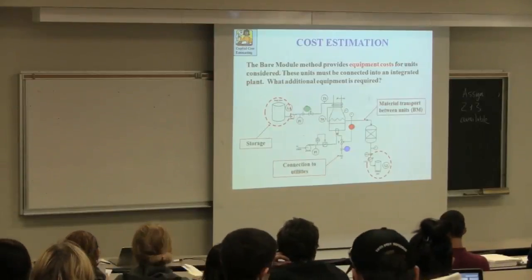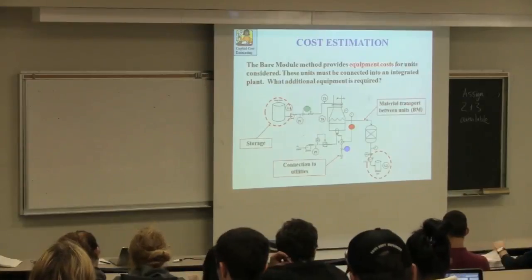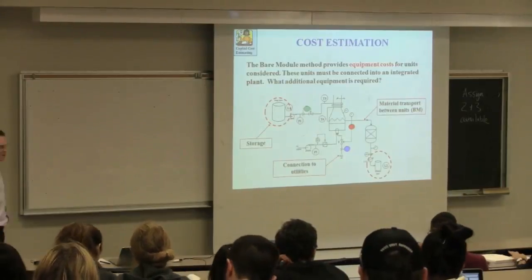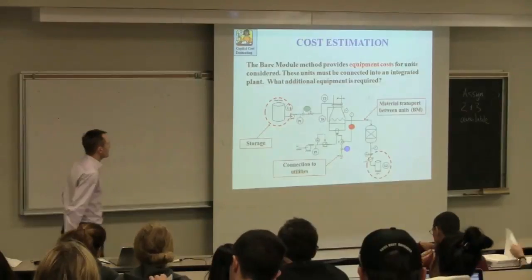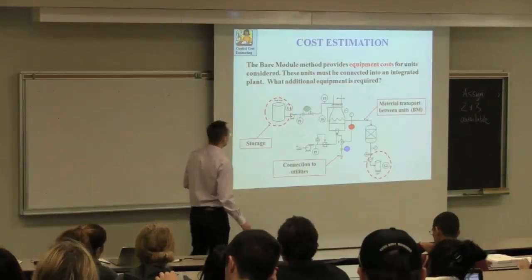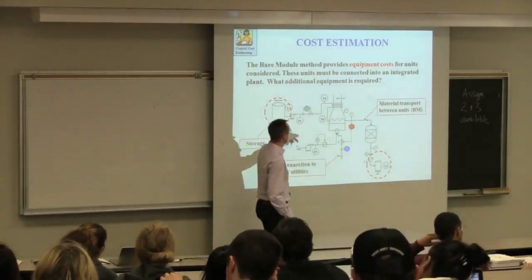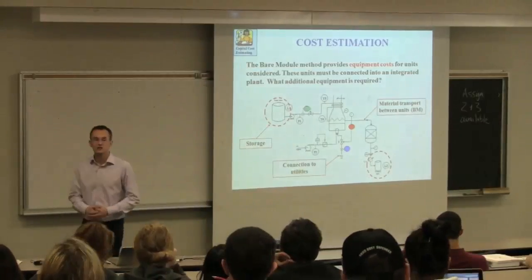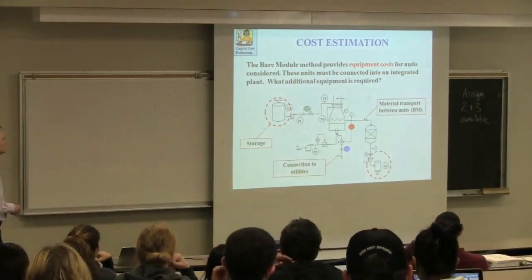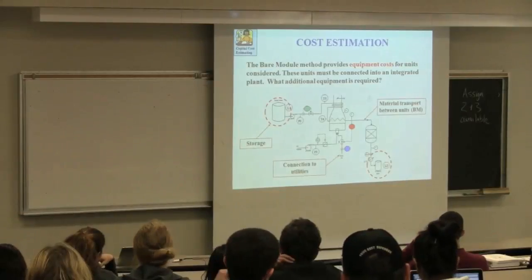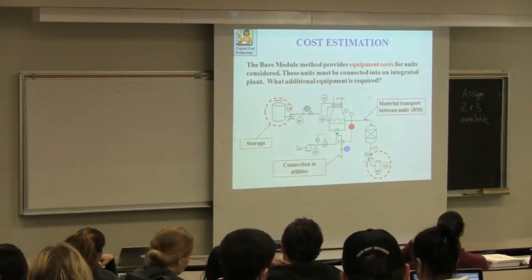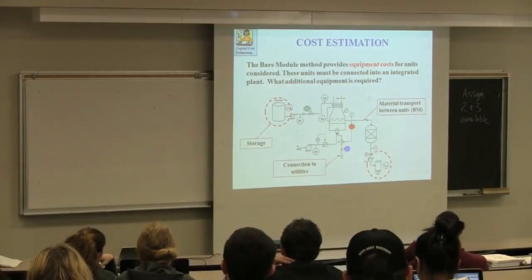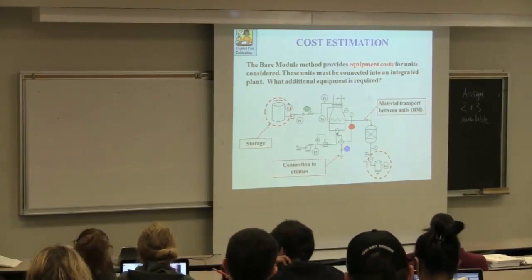The rest of the work we've done up to this point, and also how it's going to tie in with the project that you would like to do later on. So what we've done up to now was we've estimated individual units, so storage tank and fired heater. We've got the correlations for each of these major units in the flow sheet. And we've established, based on those correlations, what the costs would be for the unit, as well as some bare module region around the unit, so typically a 3 meter radius around the unit.